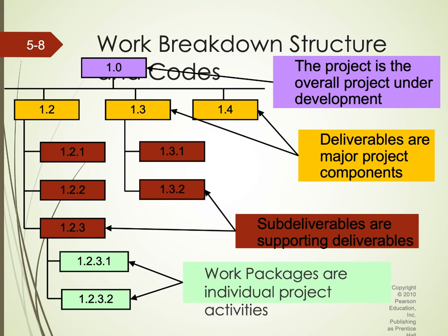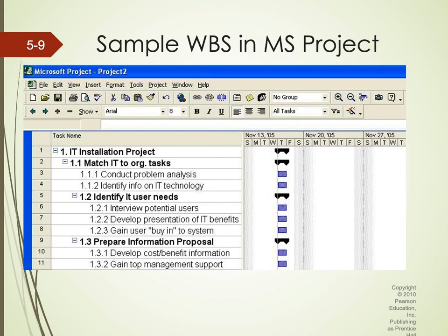So the next slide shows a sample of Microsoft Project. This is basically a Gantt chart where you can see point one, for example the main project, followed by the sub project, and over here we see the timeline, what is planned and what is actual. From there you can forecast when the project will be completed, whether you need any extra time, or whether you are putting too much time on certain things.